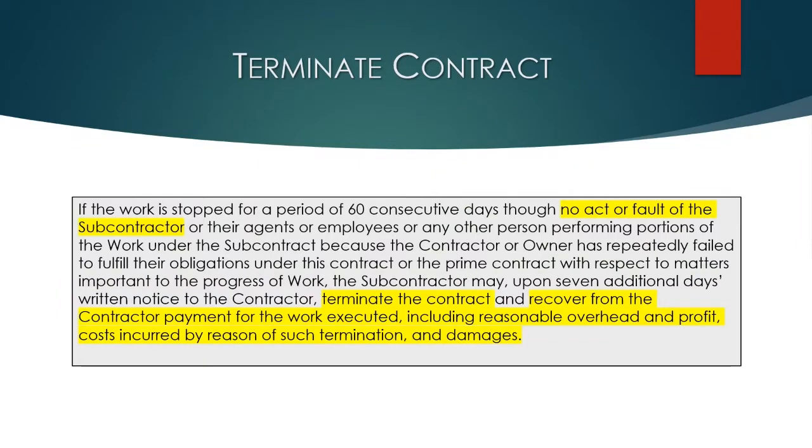What if your subcontract does not include a termination provision? Well, then it depends. You're on much more shaky ground. Your right to terminate is not well founded. Legally, you can only terminate then upon a material breach of the contract. We'll talk more about this, but payment, non-payment, could be a material breach.